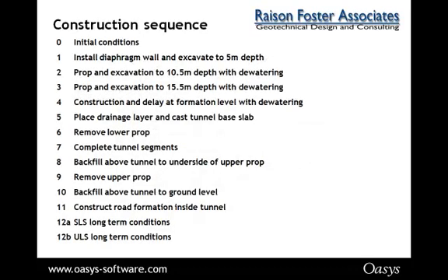So in terms of the construction sequence, this is the construction sequence. As you can see, we've got our initial conditions. We install the wall. We excavate and put the props in. Then there's a construction delay at the formation level with dewatering. So this picks up on one of SAFE's features, in that you can do a timed analysis. You've also got the completion of the tunnel segments, the backfilling, and modeling in the SLS and ULS long-term condition.